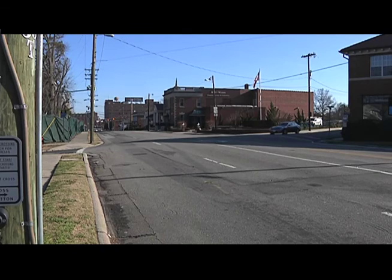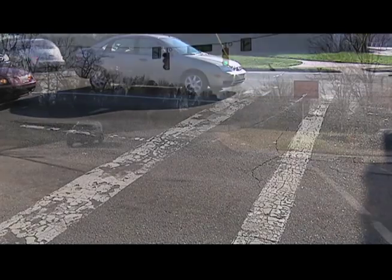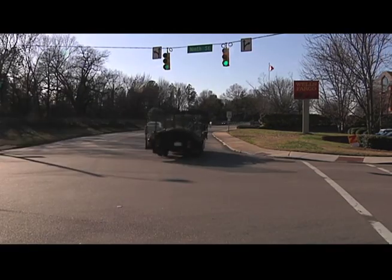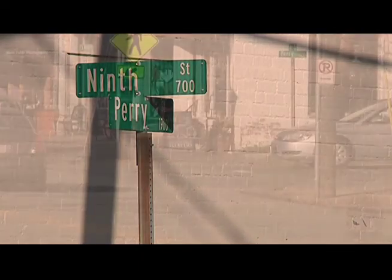Okay, all right. Well, how long is this project expected to take, and why will it take so long to do it? Well, we're installing more than a mile of large water main. Anytime you're digging in the street itself, we deal with traffic control, other utilities. So we've given the contractor about 8 months. As you said, it started in mid-February, so it'll be around September or October. Hopefully we'll be finishing up.